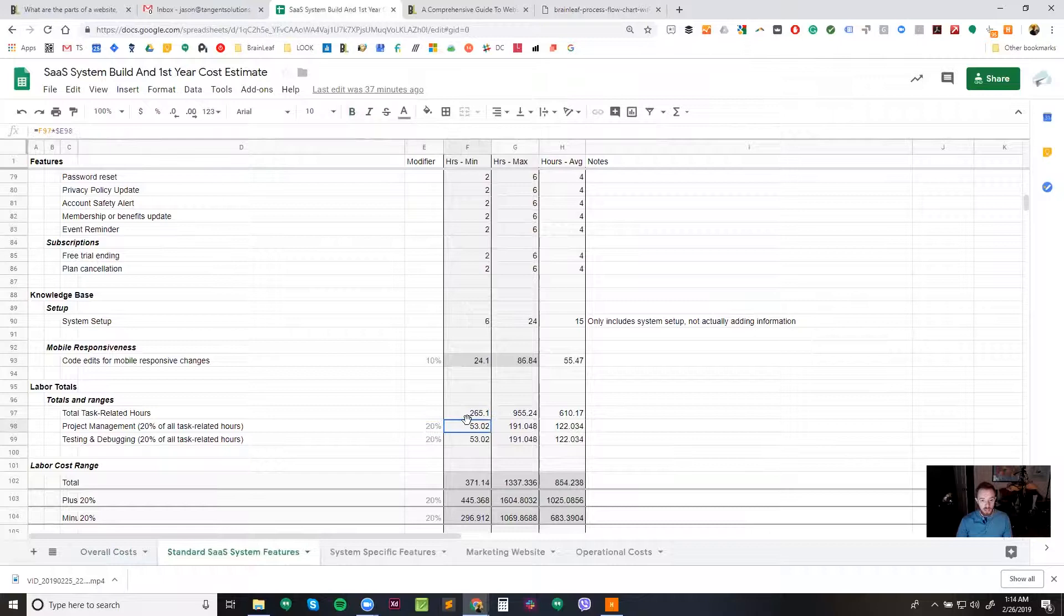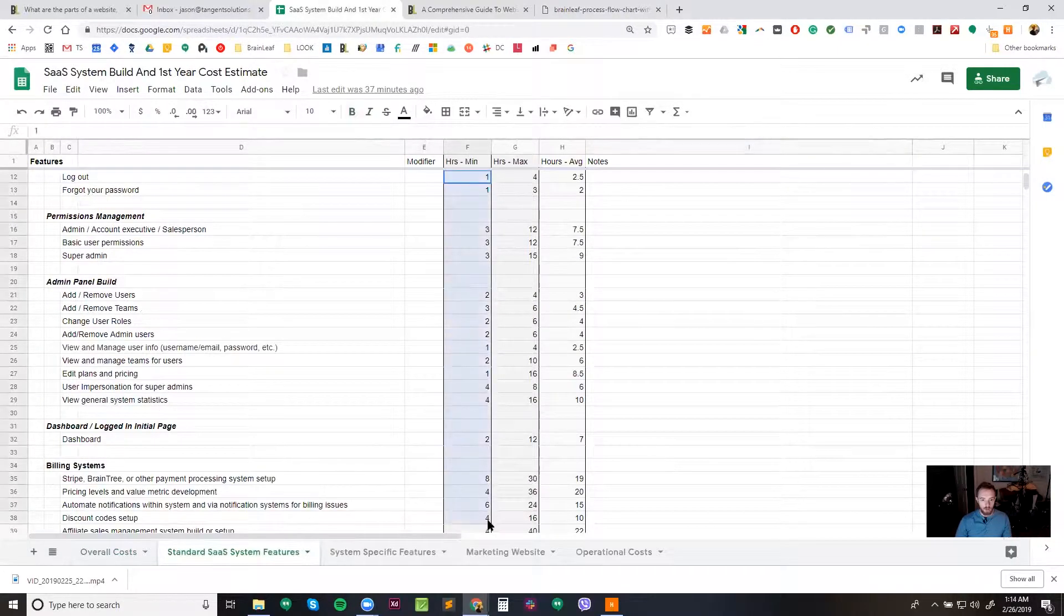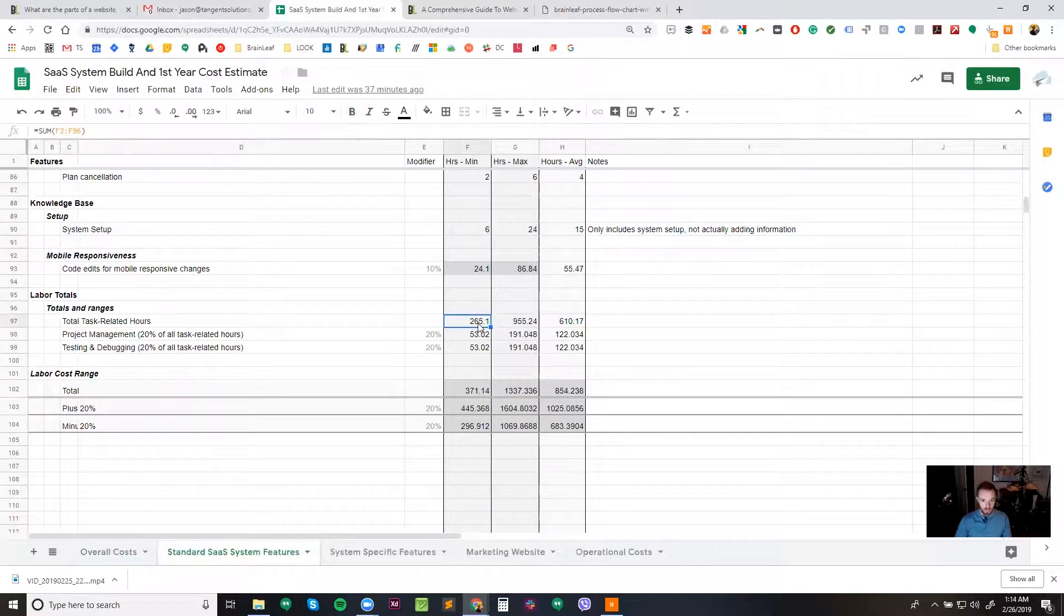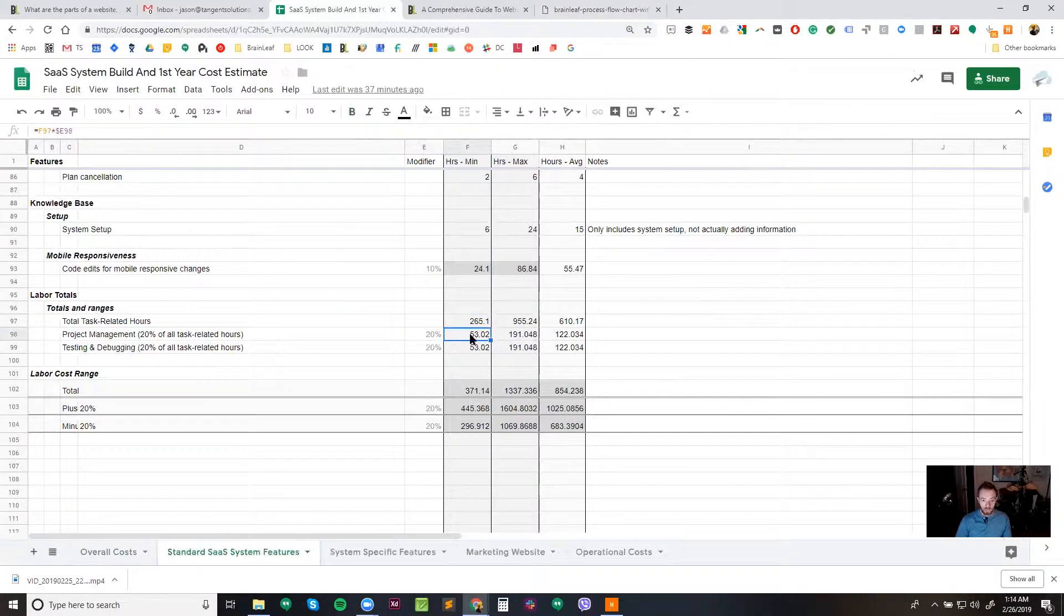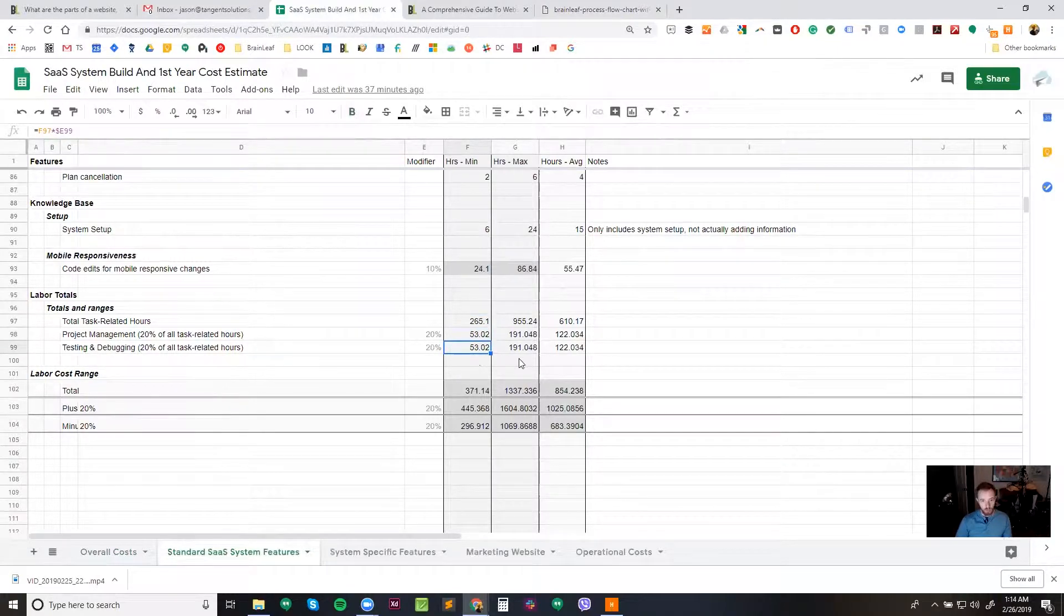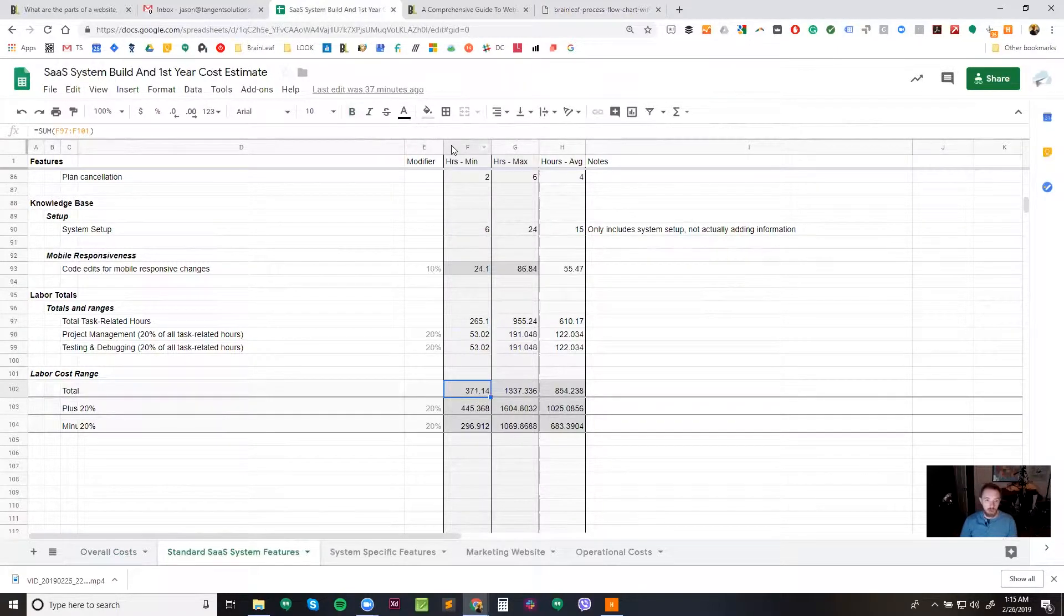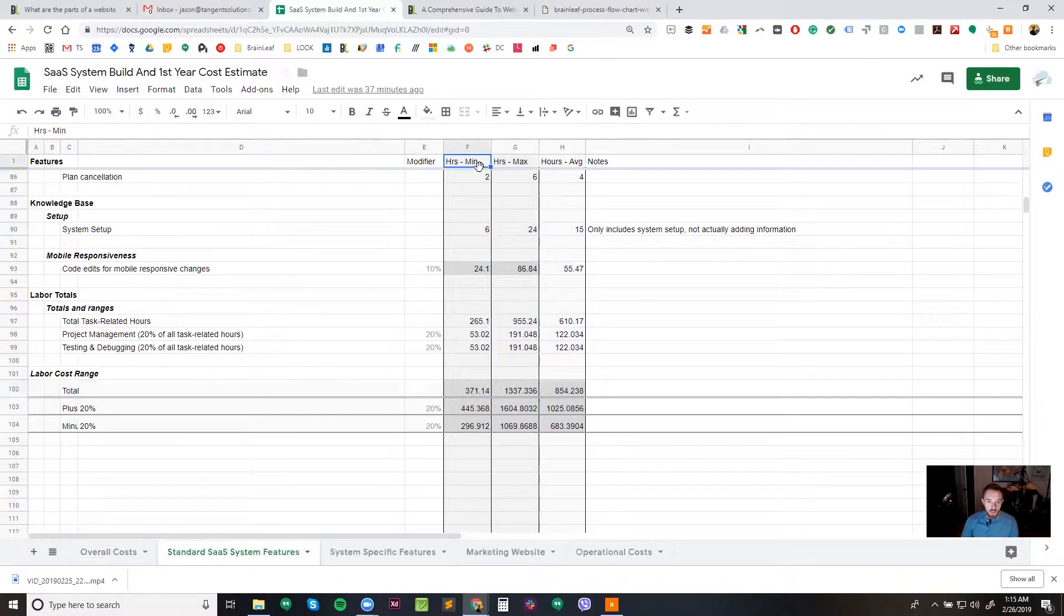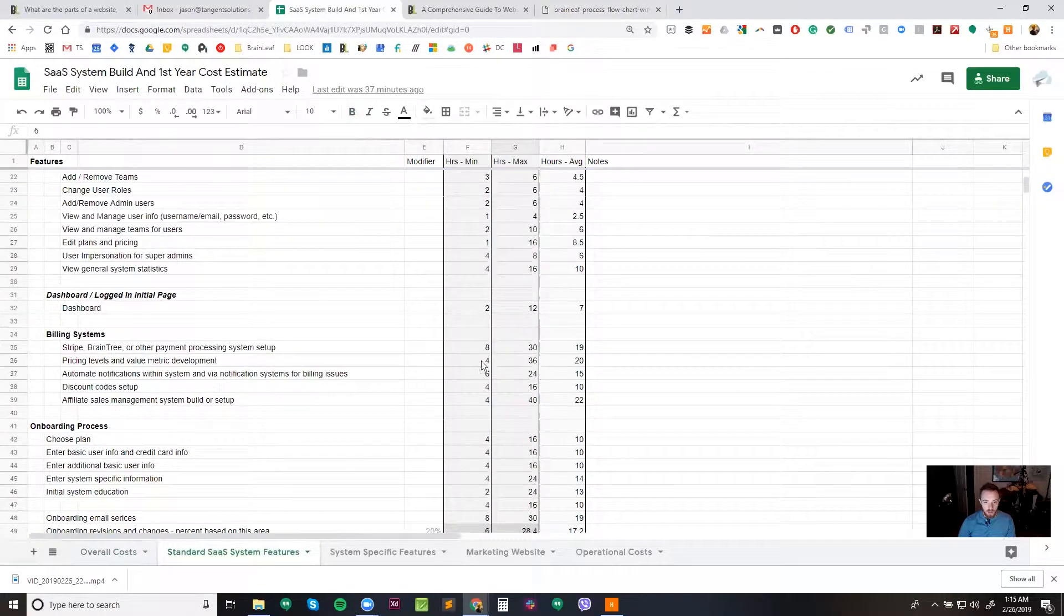So what that means is we're going to take all the hours. First, you can see here we've got some of this F2 through F96, which is all of this stuff here and all the way down to this area, this cell. We're going to sum all of that up. And then we're going to take a percentage of it. 20% of that amount is 53.02. And then 20% of this amount, again, 53.02. And that's going to give us a total labor hours, minimum labor hours of 371. And you've probably already noticed that we've got this minimum hours, maximum hours, and this average hours.